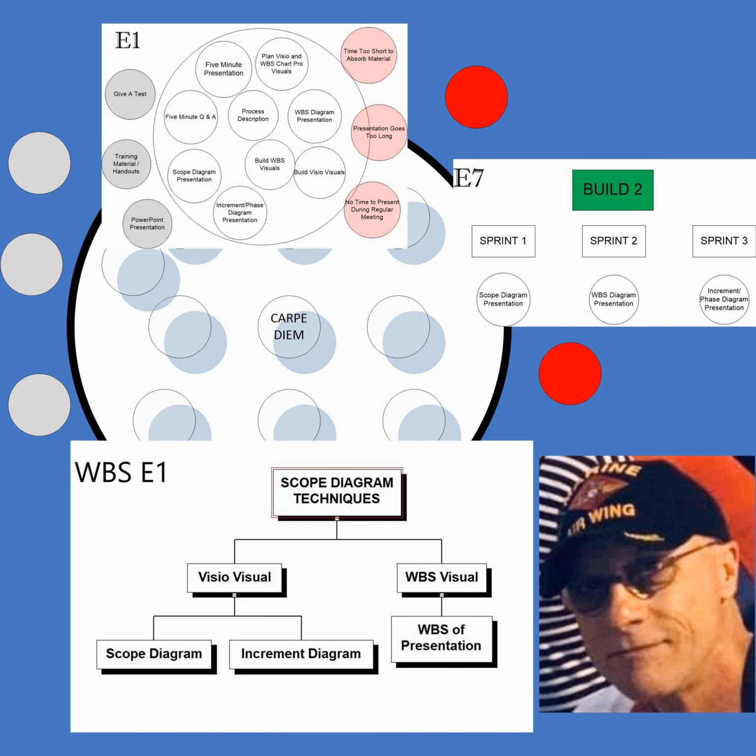Now, I'm going to go a little bit off here and tell you what happened, that I also had to add something else. Once we had meetings with the application owners, we kept asking, have you planned it out? Have you diagrammed your connections? Have you done all this? And you get, yes, I have, yes, I have, yes, I have. Well, I had 2 weeks of that. And then finally, after 2 weeks, I asked, well, can you show me your plan? And no one had one.